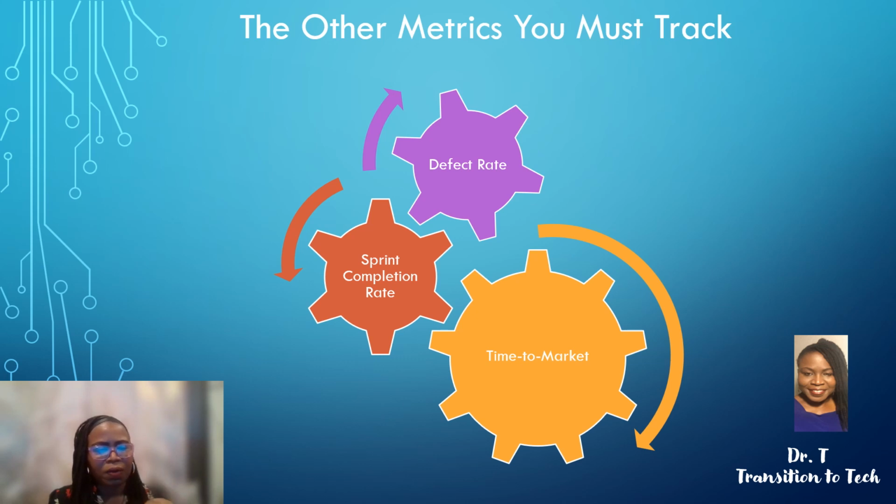We've talked about what the scope is and what the definition of ready and done is. So how much of that did you actually get done? Are we not sizing stories the right way, and therefore underestimating the level of work that it's taking? What are we doing that our actuals versus our committed are off? You're looking to monitor and control this metric as well.